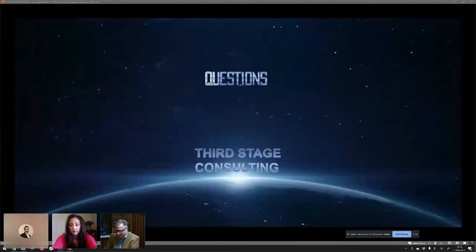Like UAT, we think is 8 weeks, and build is 7 weeks, and design is 4 weeks, or whatever it is, and then go forward again, and start tasking out what you think all of the lower level activities are, the work packages, and join those together by how long each work package is going to last, and see whether the two are anywhere near each other. Because if they're not, then you've got a potential problem.